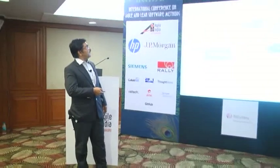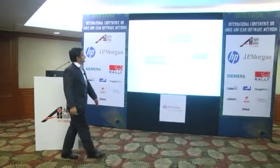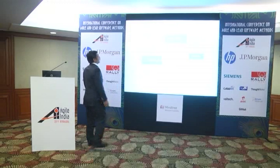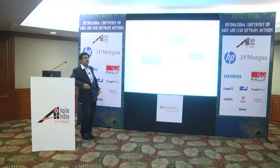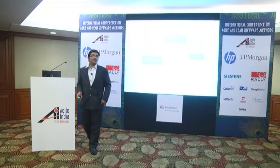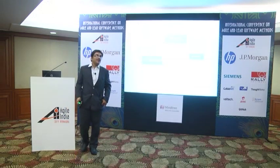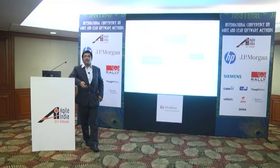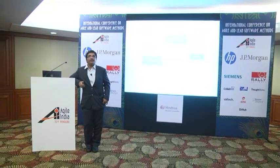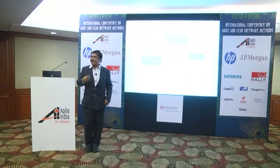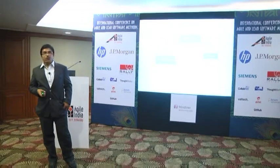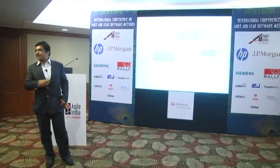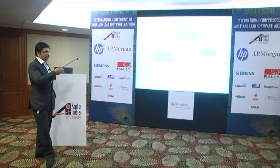We held a problem-solving workshop where we looked at past data — defects from previous releases. We did a Pareto analysis and root cause analysis based on the Pareto. We also used FMEA — Failure Mode and Effects Analysis — taking the entire process end to end, looking at how this process can fail, whether we can detect the failure, and whether we have a mechanism to address the impact.